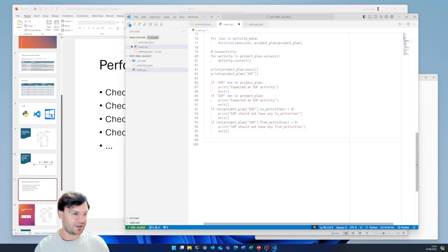So now you've done some checks there. The one thing we want to do is to check that all paths lead to the end of project and there are no circular paths. To do that, we're going to start at the starter project and try and traverse through our network to the end of project. What we're going to use there is a recursive function that hops across all the activities, and hopefully for each one, even with the branching, we should then end up at the end of project activity.